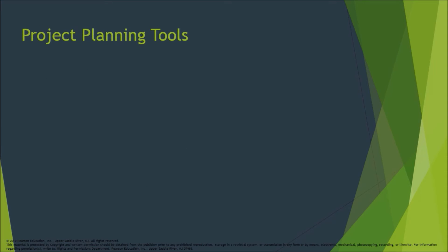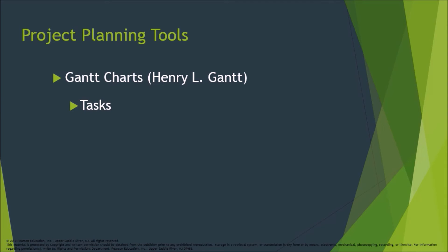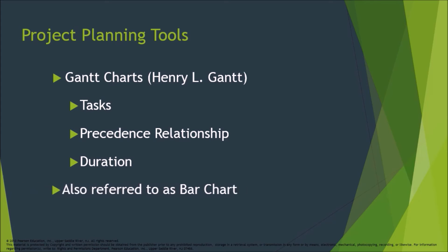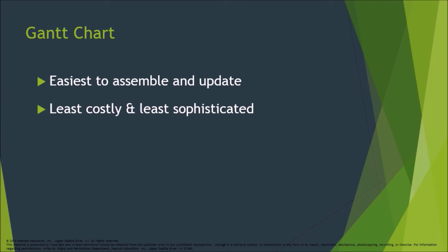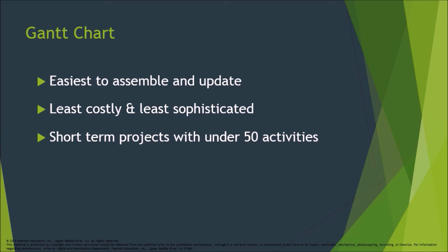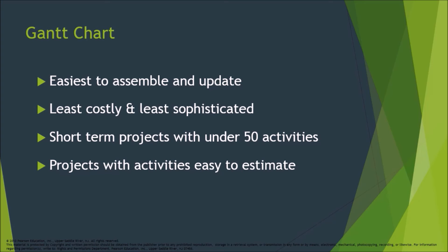Project planning tools — Gantt charts, developed by Henry L. Gantt, represent tasks, precedence relationships, and duration, also referred to as a bar chart. Gantt charts are the easiest to assemble and update, least costly and least sophisticated, best for short-term projects with under 50 activities and projects with activities easy to estimate.